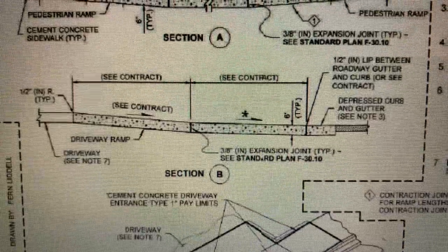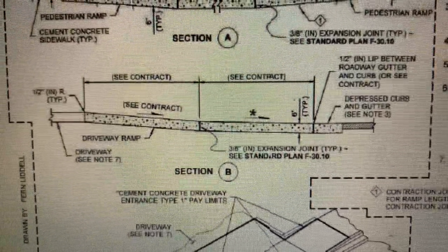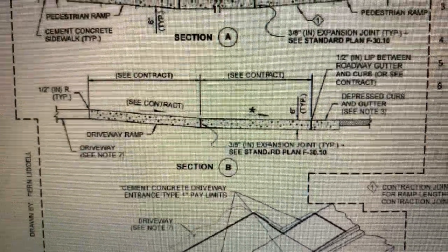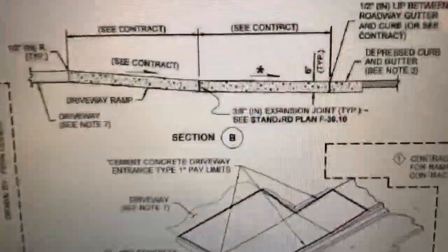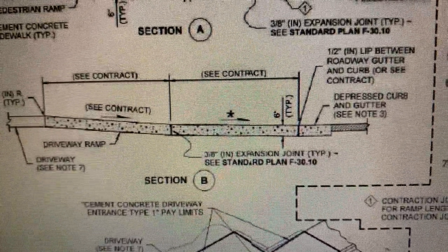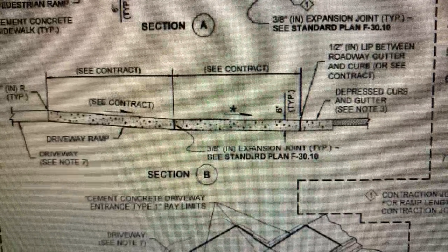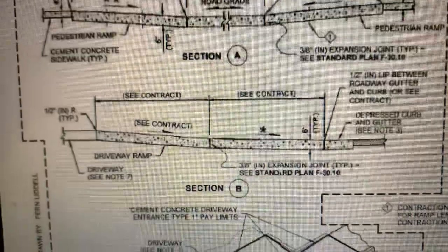They're up north, so I thought that might be good with this Mill Creek job. I also gave him Josh McKee from McKee Enterprises, and I also gave him Watterson Excavating as different companies to call to do the grading. But they would be responsible for the grading. We would be responsible for putting in the concrete driveway approach, the sidewalk there next to the driveway approach, and then the asphalt going into the parking lot.